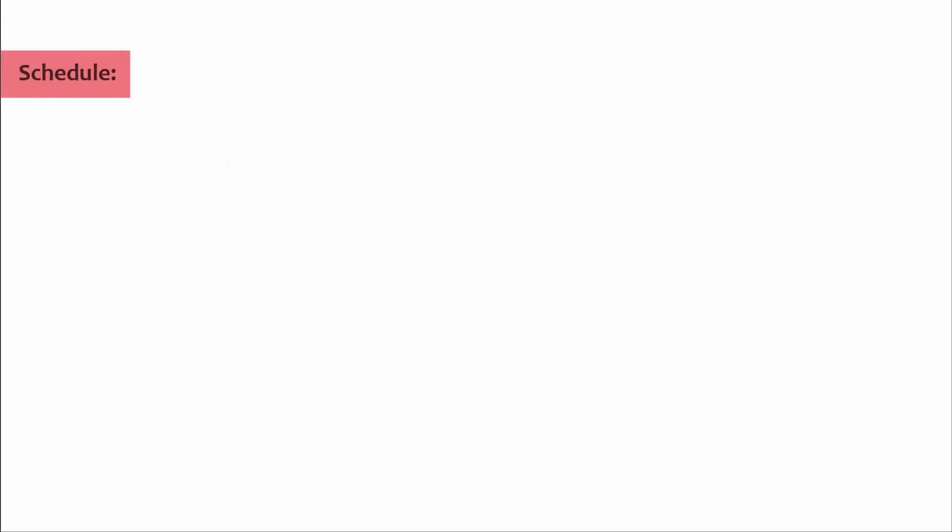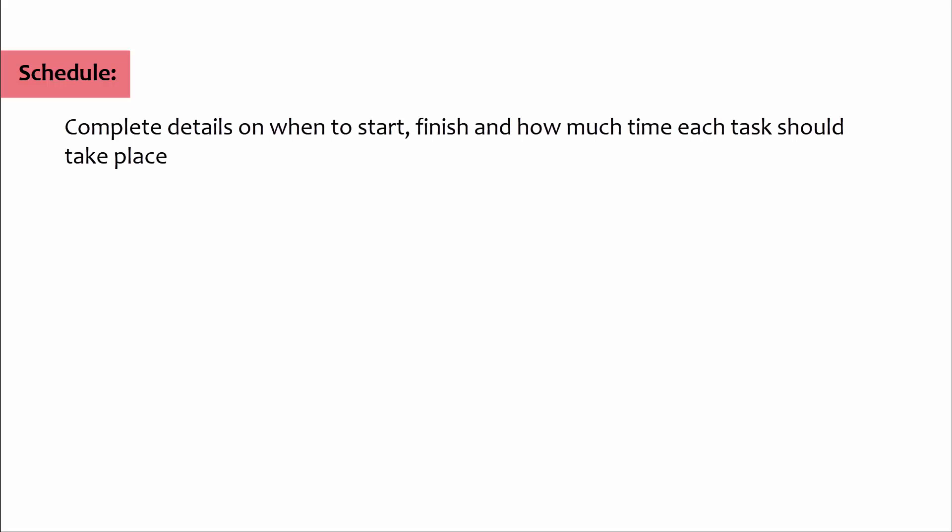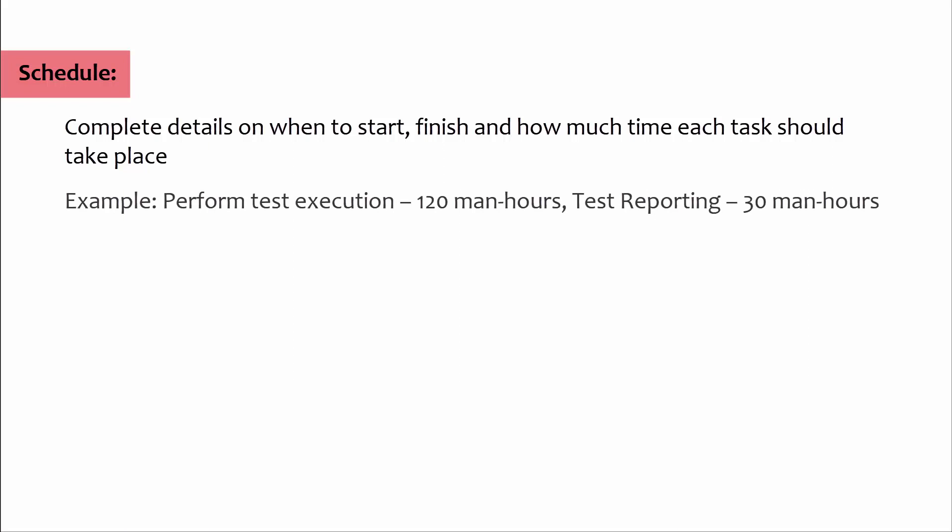Schedule: Complete details on when to start, finish, and how much time each task should take place. Example: perform test execution 120 man-hours, test reporting 30 man-hours.